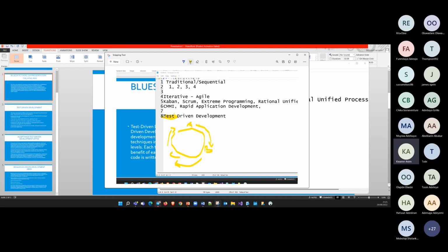Sometimes some business stakeholders do not have that idea. They have the idea of what they want, but they don't have the idea of the acceptance criteria. So business analysts are trained as analysts to dig in based on their experience to say, okay, with the loan application, if somebody is applying for that loan, and the developer is going to code the application, there should be a minimum age. The person must be in UK. The person must be working.